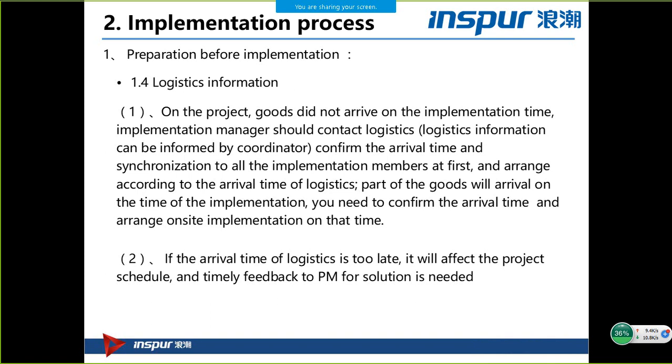If there is any delay because of traffic jam or customs, you also give the feedback to our project manager or coordinator, so that we can talk with our customer to solve this abnormal situation.